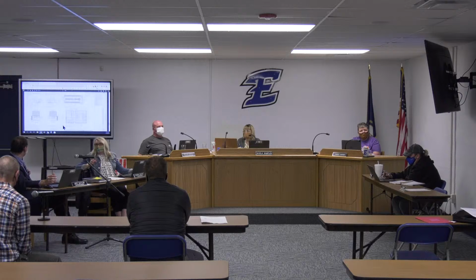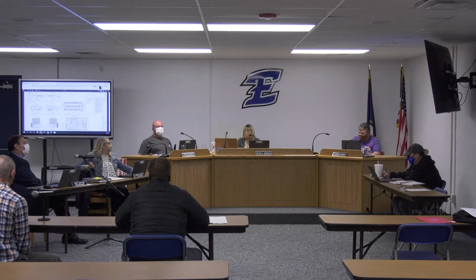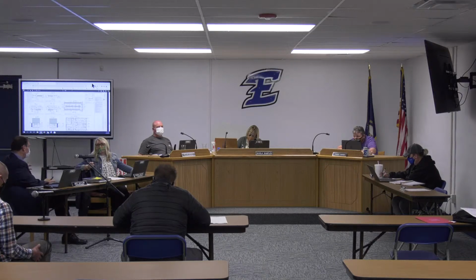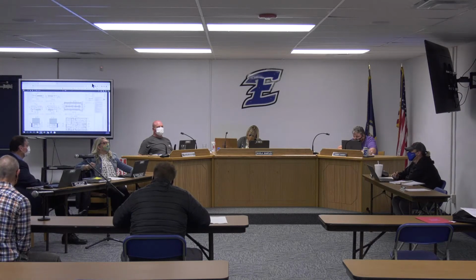And one of the things in this project, it's included that we get equipment, like the discus and the pole vault. There's $100,000 in the BG1 that will pay for all the track equipment, it'll pay for all the lockers in the locker rooms. We feel like that's a good amount. I thought we talked about that, but I was making sure. Yeah, there's that $100,000 in there to try to pay for that stuff. Track equipment's not cheap. You'll spend $60,000 of it in track. By the time you do lockers and all those different things, new lockers in our dressing rooms and stuff, $100,000, I mean, it's not that we've thrown a lot of money at it, but it'll cover what expenses we need to.